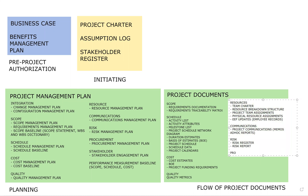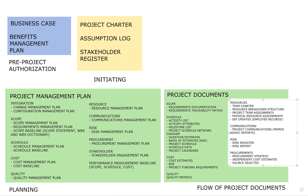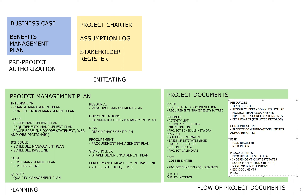Moving on to procurements — and there's a lot of procurement documentation here. We have a procurement strategy, independent cost estimates, source selection criteria, make-or-buy decisions as a result of our make-or-buy analysis, bid documents, and a procurement statement of work.